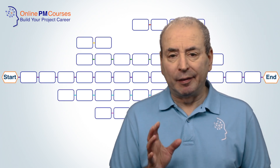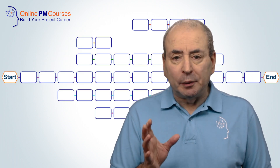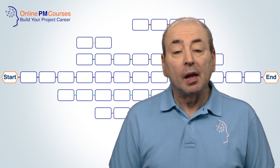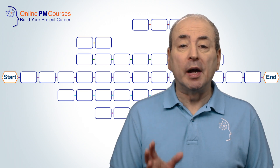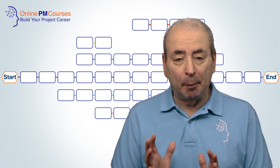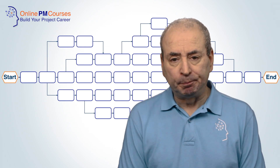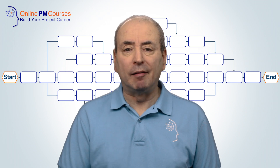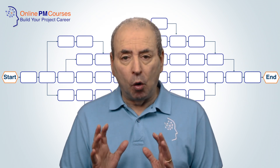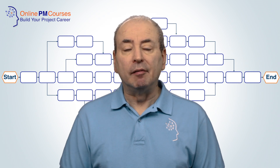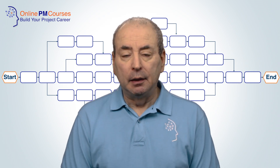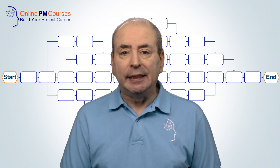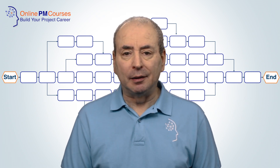Next, identify parallel paths — paths between series of dependent activities that are not dependent on one another. Sometimes parallel paths will connect up later in the project plan, so be aware that can happen. By running tasks concurrently or in parallel, you can allow the project to proceed more quickly without necessarily creating a bottleneck. But this is only possible if you have enough resources to resource each path that is parallel to the main one.